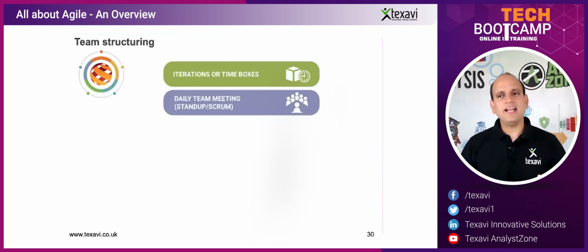So I would say what I did yesterday. I would say what I have been working on today, or what I'm going to deliver by the end of today or tomorrow. And then I would also say if I have any problems, any impediments, any hurdles that are stopping me from my work, basically, any blockers is what we call. I will explain all of this, I'll put forward all of these in the team meeting, so all the other team members know what I'm up to. So it's almost like a daily basis.